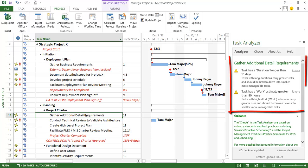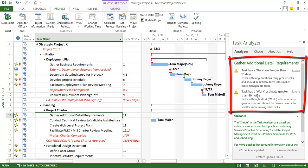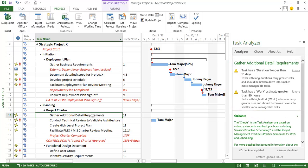The next task here, gather additional detailed requirements. It appears like it has a duration longer than 15 days. Our organization has said that we don't want tasks longer than 15 days because they carry more risk. And we also don't want tasks with more than 80 hours of effort. So ideally I should be breaking this task out into smaller more manageable tasks.